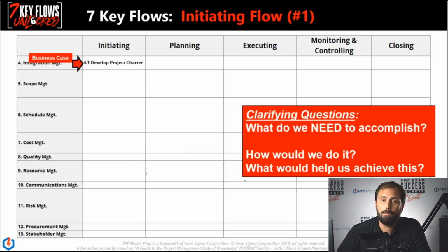Okay? And so the business case creates clear alignment on what the benefits are and how we're going to get them, in a sense. Like, it's money, it's defect reduction, it's customer satisfaction improvement, whatever. Now, inside of that business case, starting this flow out, you're going to have certain assumptions. You might have mathematical models and projections and tables that say this is what we expect the growth to be at different rates, etc. But it's going to get you an understanding of what people perceive to be the benefit of this project. Good. You're aligned to that now.